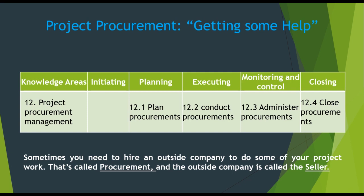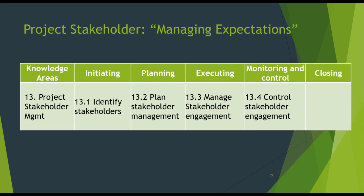Project procurement management — it is not something that the project manager has to do on all projects, but it is quite common. This knowledge area relates to the process of purchasing or acquiring products, services or results from outside the project team. It keeps track of all project procurement and supplier work, starting from planning purchases through the acquiring process, to executing the supplier tasks and ultimately closing the contract when the project reaches its conclusion. The processes are: plan procurement, conduct procurements, administer procurement, and close procurement.